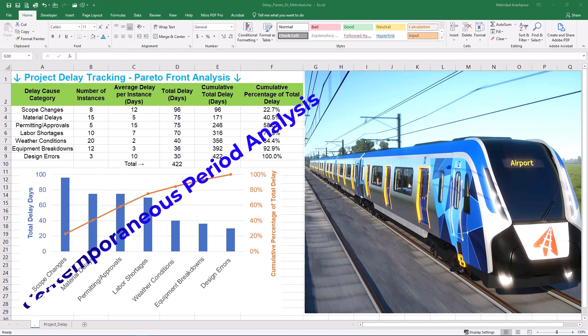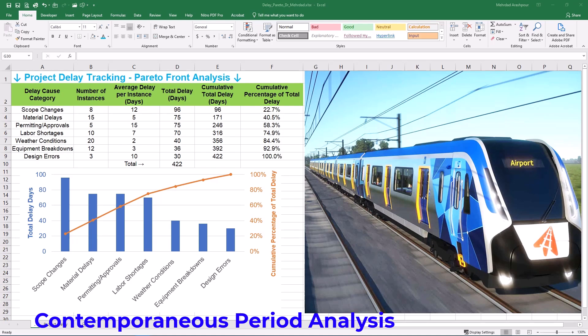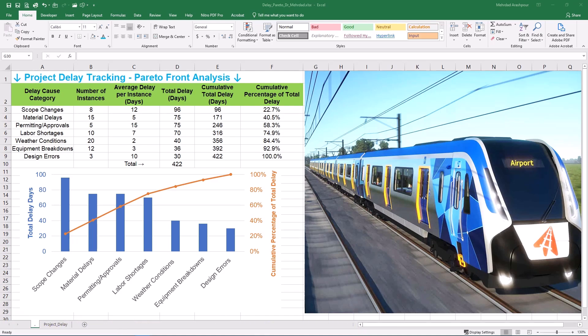Finally, we have contemporaneous period analysis — a very proactive approach. You analyze delays as they happen during defined periods throughout the project. This allows for real-time delay management and documentation, which is great for dispute resolution and proactive project control. However, it requires robust real-time data tracking systems and is therefore data-intensive and time-consuming to implement effectively.